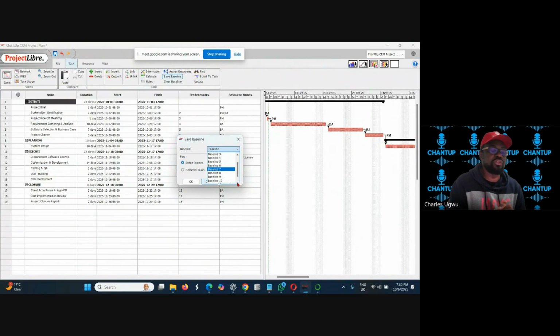then if you need to update and add that extra 2 months, you have to first baseline the original work, which is for 2 months, before you go on to create a new project that covers 4 months. And after creating the 4 months, you equally need to baseline it. That's what I call baseline.